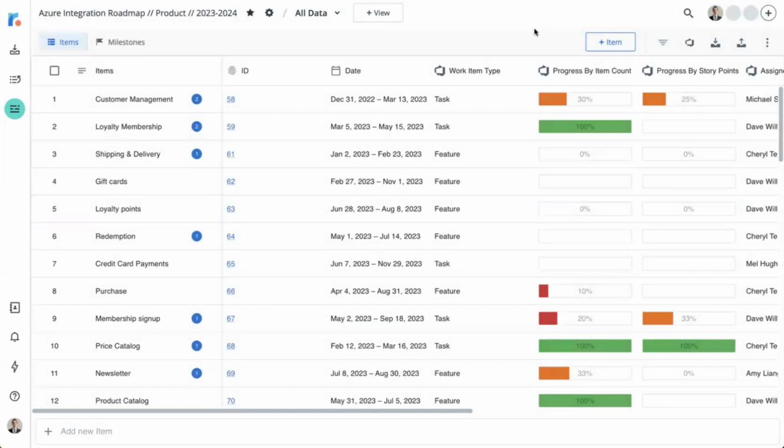So in terms of the changes that you make, regardless of the changes you make, will be reflected on the sync. For example, I cannot suspend work item type if I have brought it in. Any changes that I make to this will be reflected in a two-way sync scenario. However, of course, if you make a one-way sync, your source of truth will be in Azure DevOps. So just keep that in mind.